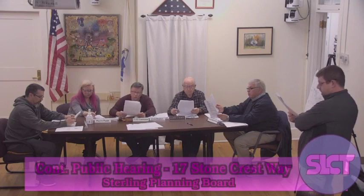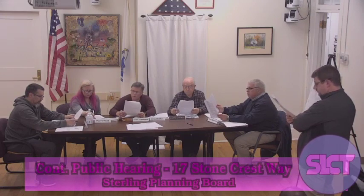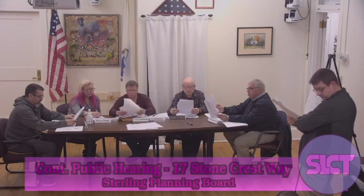15, the applicant shall follow the inspection schedule set forth by the Planning Board's peer review engineer and shall give a 48-hour notice to the Planning Board's engineer whenever an inspection is required. 16.